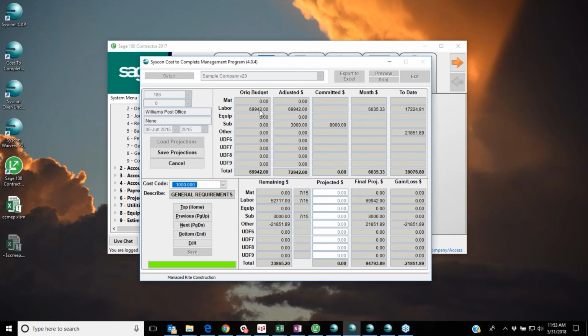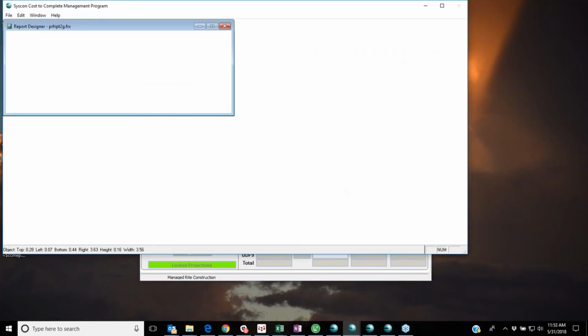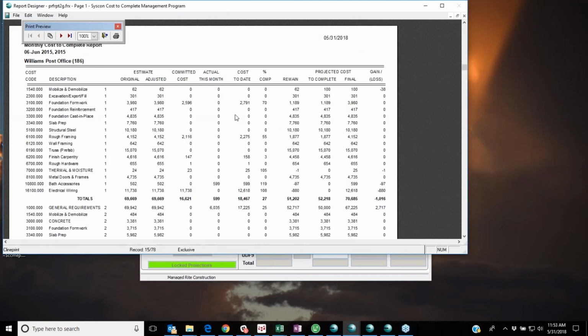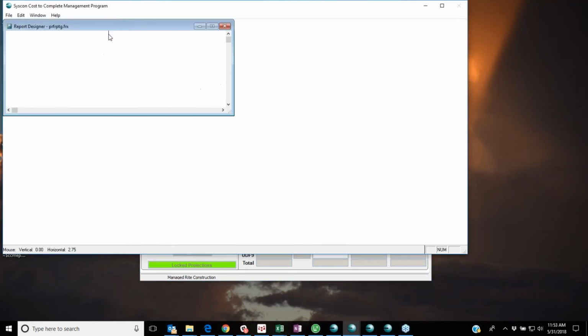So if I go through, I can say on my labor, okay, I've spent $17,000 so far. So let me edit my projections. Instead of spending $52,000, I'll spend $50,000 to finish that up over the job. That's going to give me a little bit of a gain on the job overall of $2,717. Once I'm done with that, I save it, save my projections, and I can preview a report that gives me all that information in detail about my projections to date, what my final projected cost to complete is going to be on that job, and my final profitability.